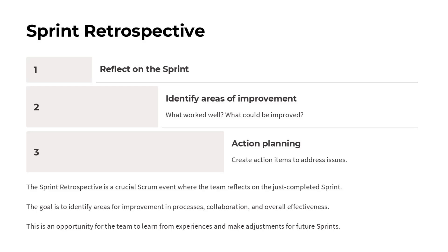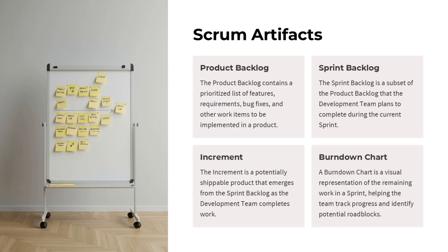The sprint retrospective is a key Scrum event where the team reflects on the previous sprint. The goal is to identify areas for improvement — what worked well and what could be better. This is a chance for the team to learn from their experiences and make adjustments for future sprints. We go through a three-step process: reflect on the sprint, identify areas for improvement, and create action items to address issues. By thoughtfully reviewing the sprint, we can continuously improve our processes and collaboration.